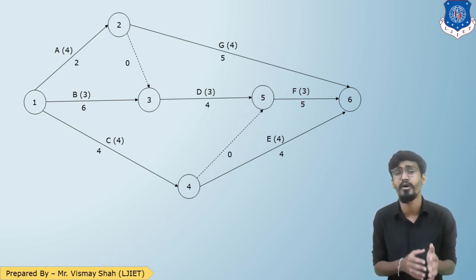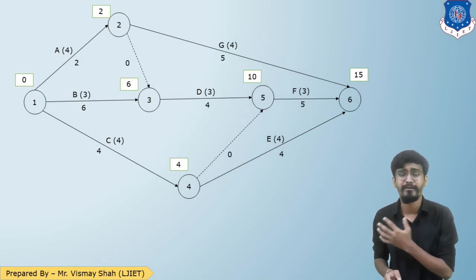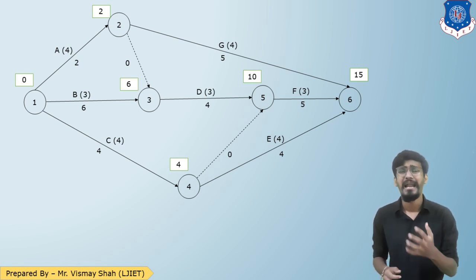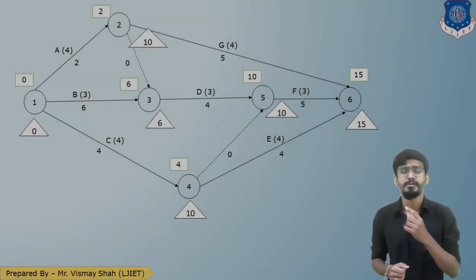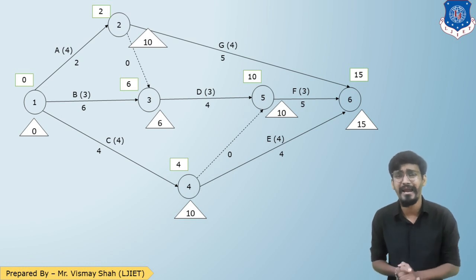The first step is to perform forward and backward path analysis. Here are the calculations for the forward path analysis, and we have obtained the final duration as 15 days. Here is the calculation for the backward path analysis. On the basis of the forward path and backward path, let us prepare the table of floats.